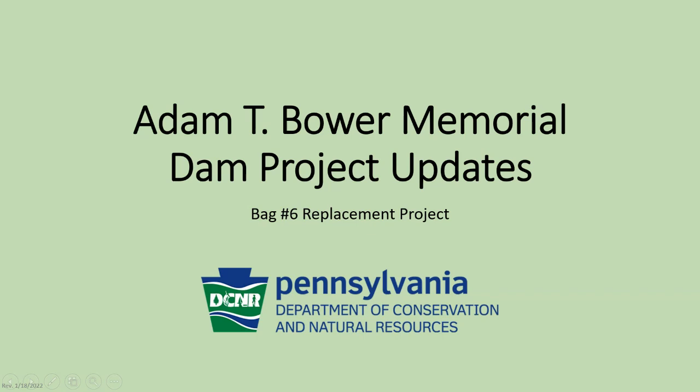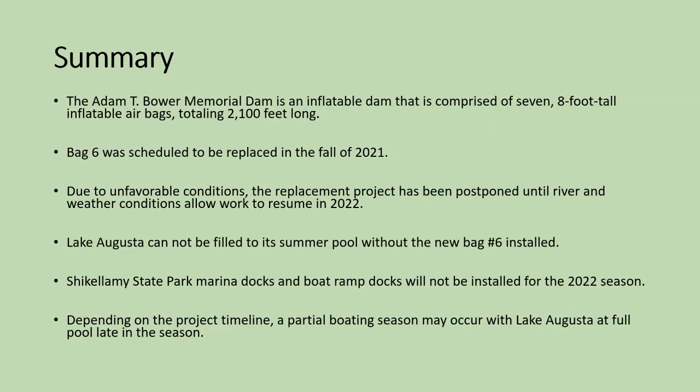So to make an initial summary of the current inflatable dam project, the Adam T. Bauer Memorial Dam is an inflatable dam, and it is comprised of 7 8-foot tall inflatable airbags, totaling 2,100 feet long across the Susquehanna River. Most of the bags are 300 feet long each, and that includes bag 6, which is the topic of today. Bag 6 was scheduled to be replaced this past fall of 2021. But due to unfavorable conditions, the replacement project has been postponed until river and weather conditions allow work to resume later in 2022. Lake Augusta cannot be filled to its summer pool without the new Bag 6 installed.